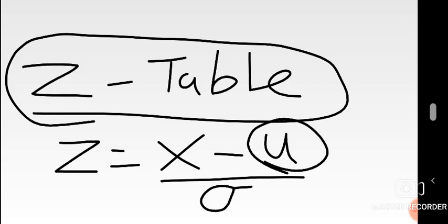What is the mean? Mean is basically what we've been doing throughout the PERT evaluation. Those values we are getting as the mean duration qualify as the mean. So you list the mean for all the activities given: from 1 to 2, you put the mean duration. From 1 to 3, you put the mean duration, and I'll be showing you very soon how this needs to be answered.